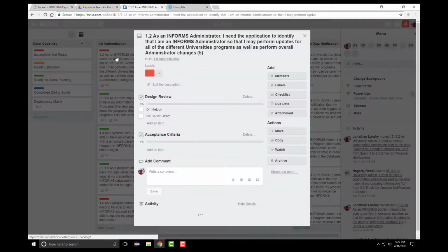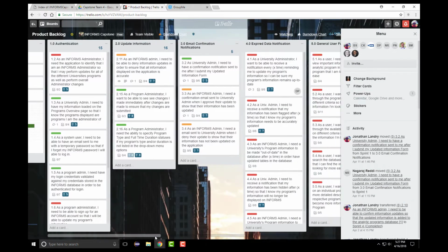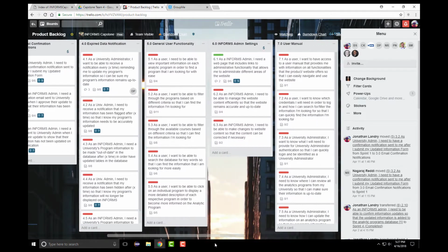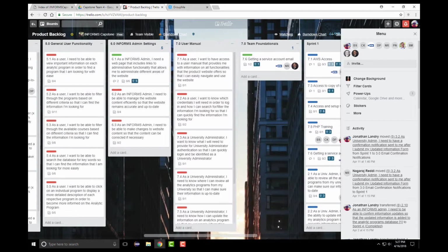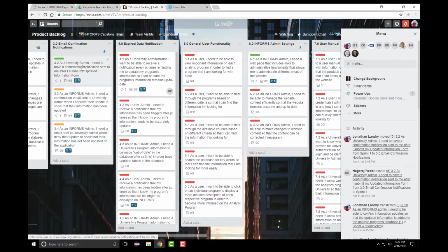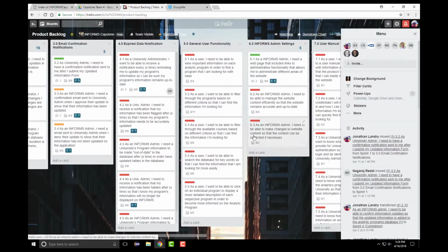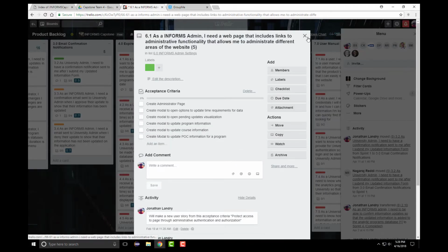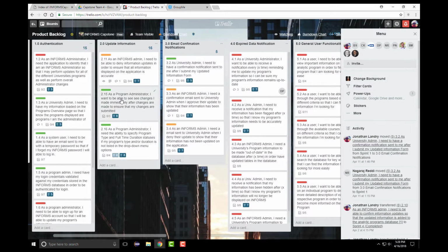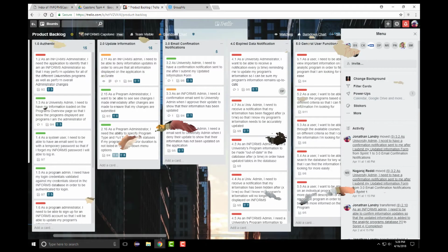The product backlog is where we track all functionality that can be designed and built in future sprints. This backlog, if incomplete, will live beyond the life of our project to be picked up by another team. The product backlog is divided into epics, which define each section of major functionality to be built. Each epic is made up of user stories that define a single specific function and provide their perspective of which user it impacts, what they will be able to do, and why. Each user story is defined by acceptance criteria that are the specific requirements needed to complete the user story.